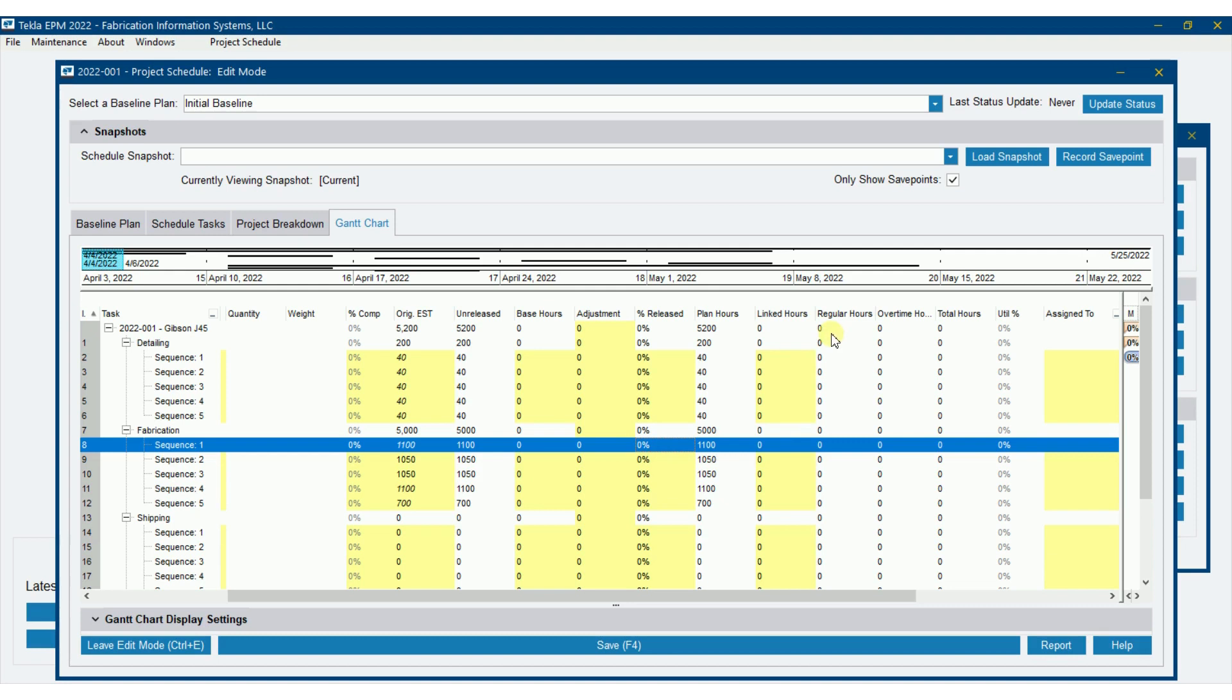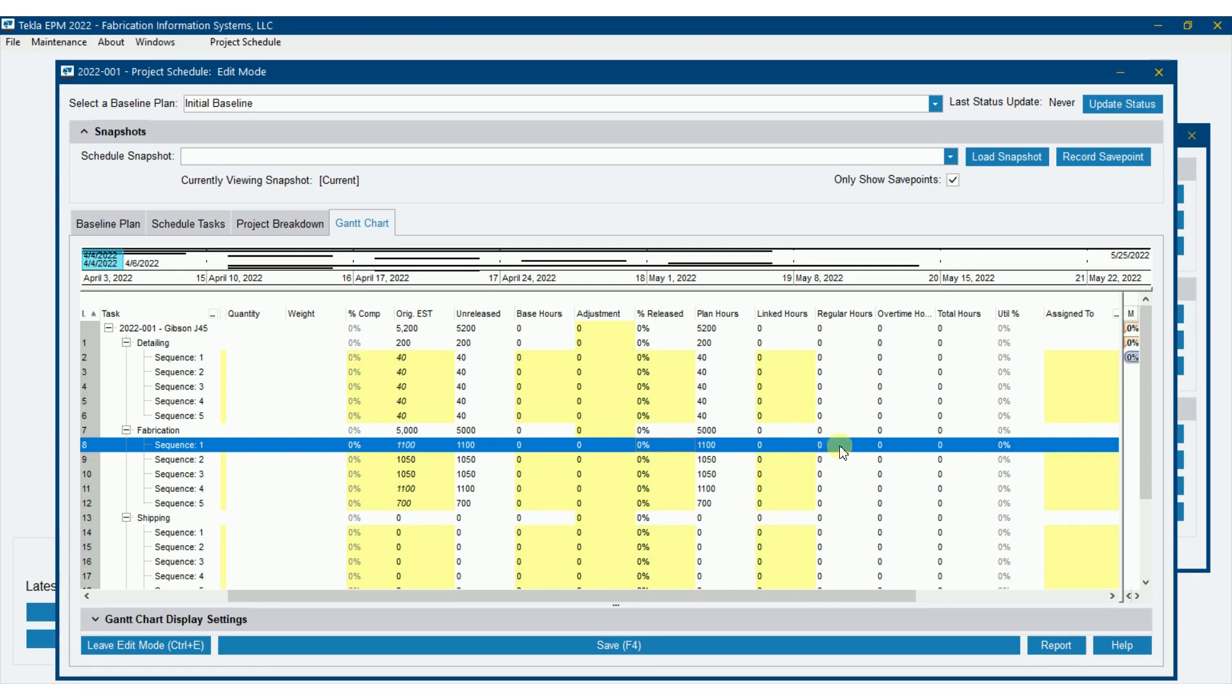Now we've got linked hours, regular hours, overtime hours, and total hours. The linked hours is coming from processing the production stations and plugging in hours every time someone processes a production station in the shop. There's an hours and minutes field down there. That will flow directly into the linked hours here. Or regular hours and overtime hours and total hours, we could plug in hours or import hours to fill those in. We'll get into that in a subsequent video as well.